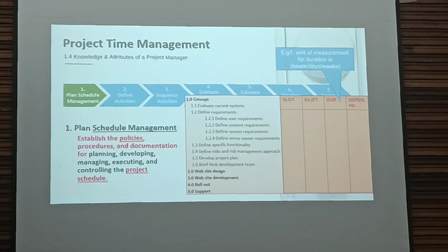You don't use days for one task and hours for another task. It will be very confusing and difficult to manage. Use standard duration. If days, all days. If weeks, then all weeks. If hours, then all in hours. Don't mix.